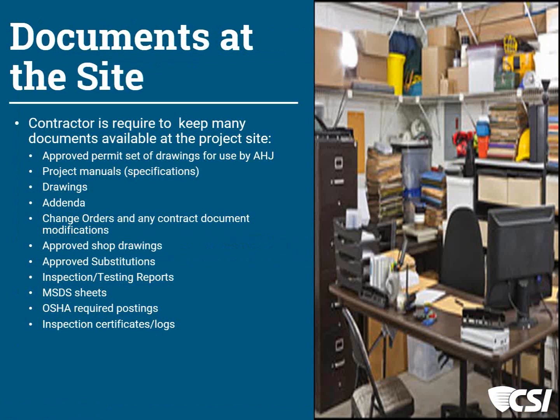The reason this is important, let's take a look at the next slide, is there's a lot of information that we typically require to be maintained on a project and accessible for not only us, but for the whole construction team. There's a permit set of drawings. The authorities having jurisdiction make their marks on a set of drawings that are maintained in these offices, so they obviously need to be organized and accessible. There are addenda that happen during the life of a job that everyone needs to know and use. Change orders as well, so that they're working off the most current set of documents, and whether it's submittals, shop drawings, or products that maybe have been approved but with slight modifications, all of that information needs to be there for their use and for ours as we are on a job site doing our observations. So these trailers are important.